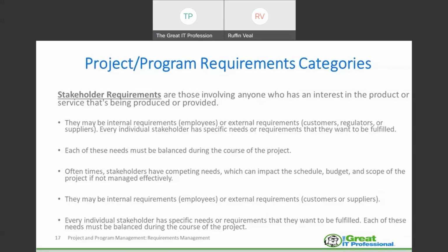We know that there are some requirements that are absolutely necessary, absolutely positively needed on day one. I came out of IT. On day one of an IT project going live, these are the absolute essentials that they have to have. Those are the ones that we want to put at the top, and the ones that we want to make sure our business analysis evaluations point out. Why is that? Because it's from this that we're going to be developing our project plan, our project schedule, and allocating our resources throughout the project.